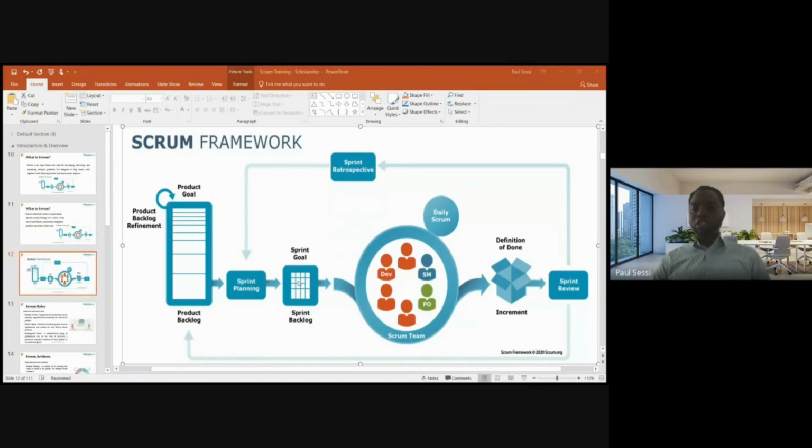You log all of those things and you make sure that you clear those logs, because if you don't, it would affect the team's velocity. With that being said, now there is also what we call the acceptance criteria. While you are doing your planning, you are putting some acceptance criteria to say that for this increment to be called done, this is what we would accept. And that will also ensure quality from the get-go.